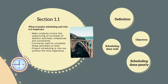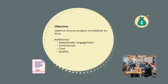The primary purpose of project schedule management is to help complete the project on time, and there are a couple of other benefits of project scheduling. These include stakeholder engagement — the project schedule is a useful tool for managing stakeholders including clients and community, making it simple to communicate when things will be happening to help stakeholders plan and manage project impacts. There is also a contractual benefit, as contractors are often contractually obliged to maintain an accurate and realistic project schedule.